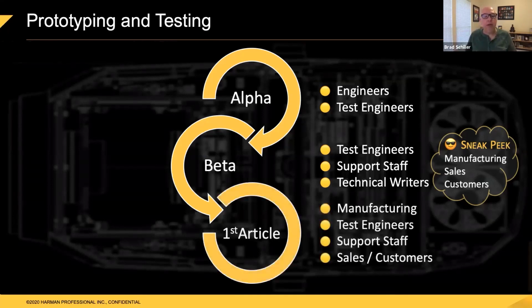Then finally, you manufacture what are called the first article prototypes. And these go down to the manufacturing line or into the factory itself. And they're built the first time that they've ever manufactured these actual lights in the factory. And they're going to find problems along the way. They're going to say, again, maybe the cable harness is wrong, or they've got to develop a different jig to lay out to assemble the color mixing flags. They'll figure all that out while building the first articles. And they'll take longer to manufacture that first time, but they'll get better and they'll have a better understanding of what it takes to build those lights.